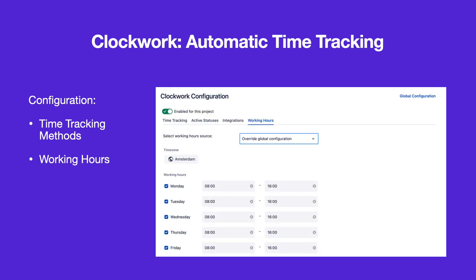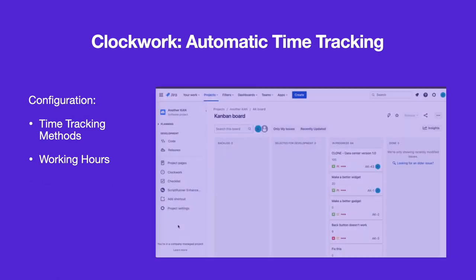Clockwork will use working hours to calculate the actual time worked. Working hours can be set at a global, project, or user level. Clockwork will always use the most specific working hours available.